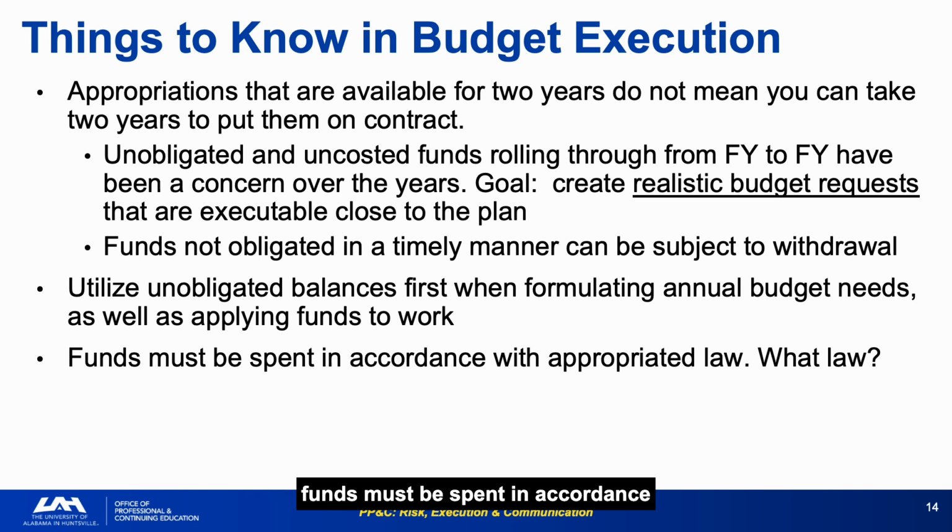All funds must be spent in accordance with appropriated law, which leads directly to the Anti-Deficiency Act as the primary legal constraint on budget execution. Before submitting any new budget request, reconcile your unobligated and uncosted balances from prior years. They count against your new requirement, and ignoring them is both inaccurate and subject to oversight.